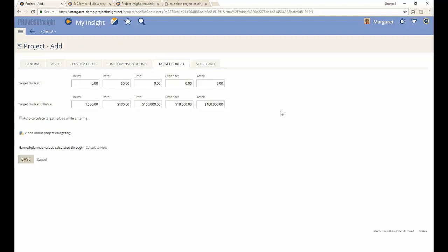The target budget is the cost that this is going to take from our company. So if you're doing professional services projects, some teams do want to track how much their hours cost them and get those actual totals to compare. And some teams just want one big target number that we're going to charge the client. So in our case, let's go with $100,000 of total budget billable.